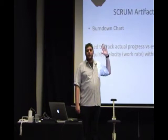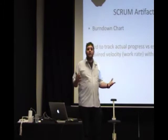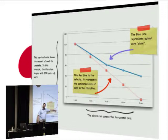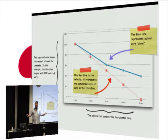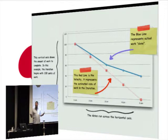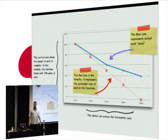The next artefact is the burn-down chart, which goes hand-in-hand with the task board and feeds from it. You start at the beginning of the sprint at the total estimated hours for all stories combined, then draw your ideal burn-down line to the end. Each morning, after the task board is updated, the Scrum Master updates the burn-down. Anyone — stakeholders, management — can walk in and immediately see whether the team is struggling and won't make the sprint. It's all about communication and identifying problems early.